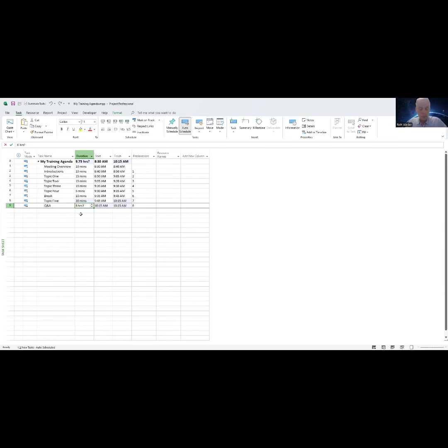And so again, for this agenda topic, we know it's going to take 20 minutes. So if I type in 20 and M, you'll notice that that question mark is now gone here, as well as gone from across the top here. And we can see that in order to cover all these agenda items, it's actually going to take a little over 2 hours, right? You can see right now it's going to start at 8:30, but end at 10:35 a.m.